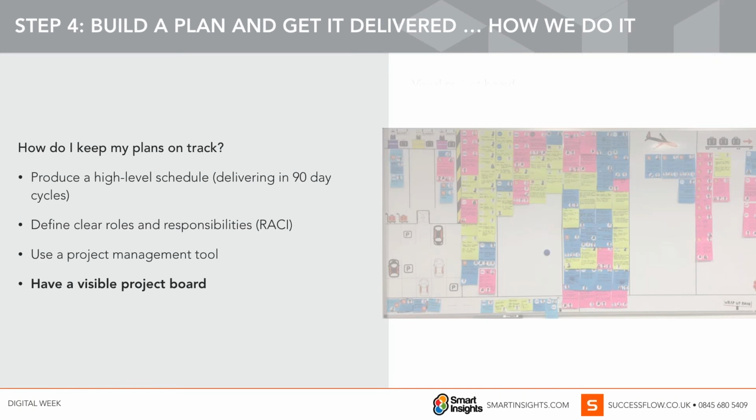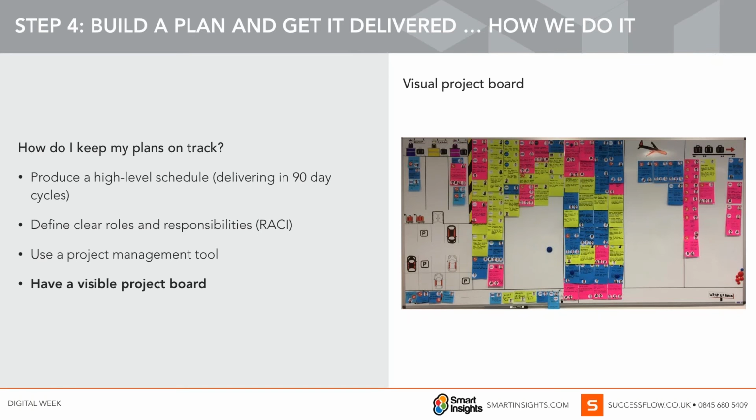And then this is one of the things that we've brought on board quite recently, and it's really helping the understanding of where we are, having that visibility. So we've got a board here, you can see the visual, but really there are different elements of it. When something comes in, a new idea, a new project, it needs to be checked in with the team. So make sure you've got the right team around, so go to that checking point. There also may be some time when something's parked because you're waiting for somebody else to do some work. So have an area where you can just park things, as we have, the departure lounge, somewhere where things can be held and not forgotten about.